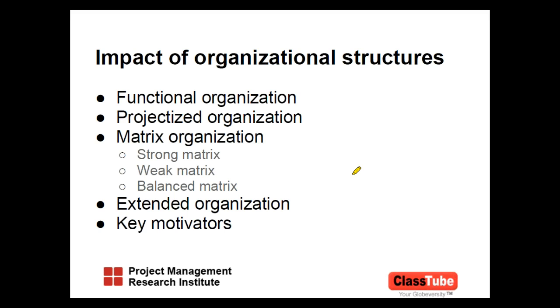It determines the power equations within the organization. In a functional organization, the project manager will have very little authority, whereas the functional manager will have maximum authority. In a projectized organization, the project manager will have maximum authority,